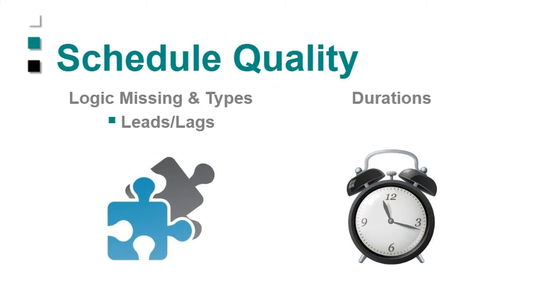So let's start with schedule quality. We typically always start with timing, so schedule. Then we go into resourcing, and then we go into cost. That's typically the way you dig in to develop your schedule. You may not be using every single aspect of P6, but that's what you'd want to grow into: schedule, resourcing, and then costing. So let's start with the schedule.